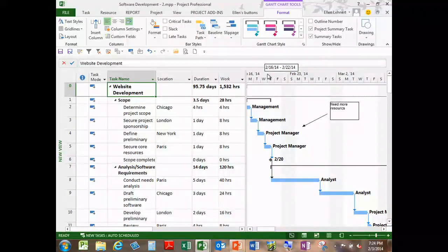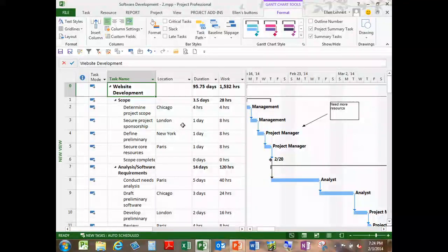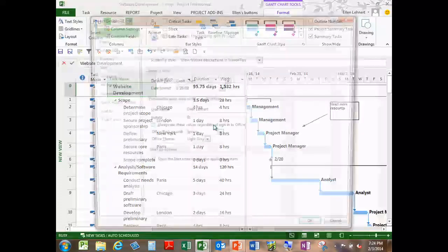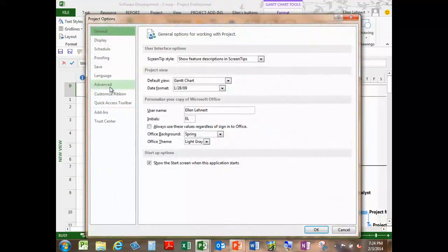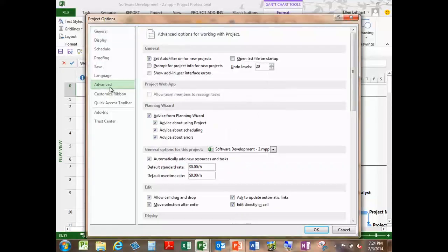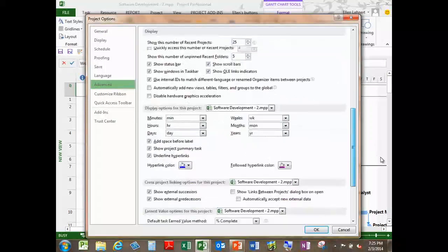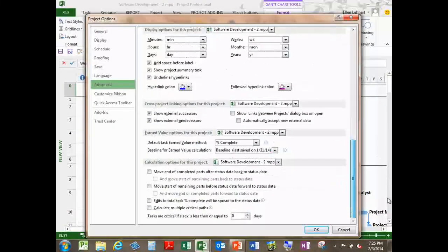All right? Yep. Oh, Nina. Absolutely. Nina, can I just repeat what Nina just told me? Nina reminded me, is it under Advanced? There's an option that says every time I create a project, just automatically turn on the project summary task for me.